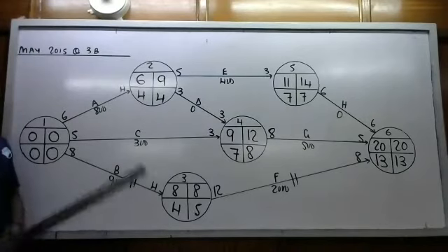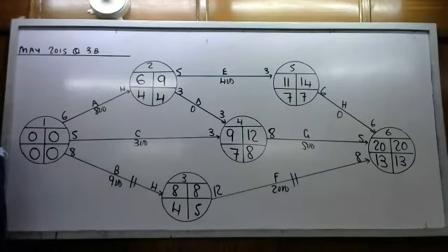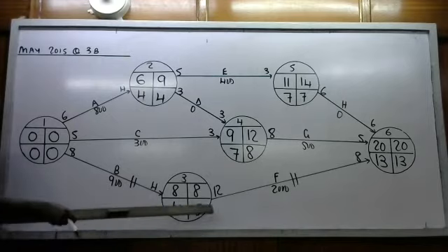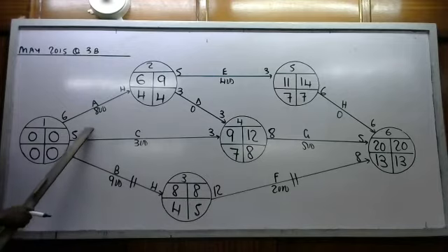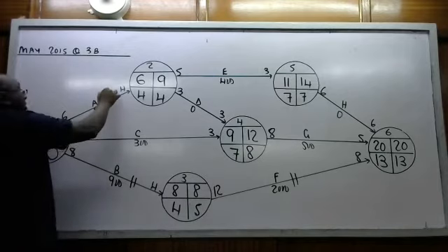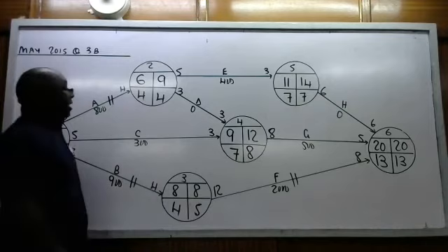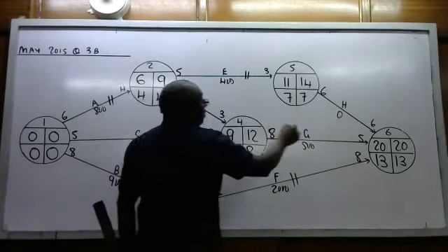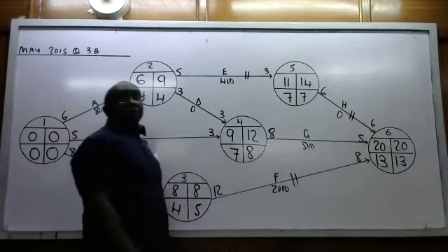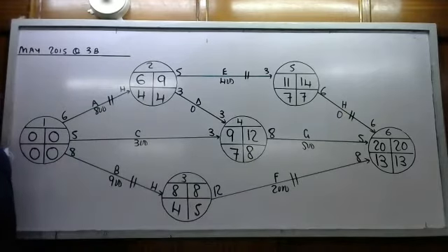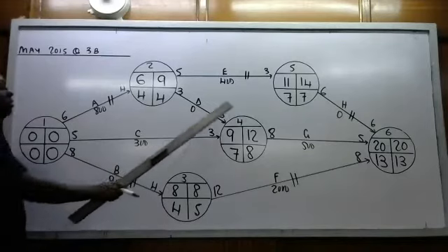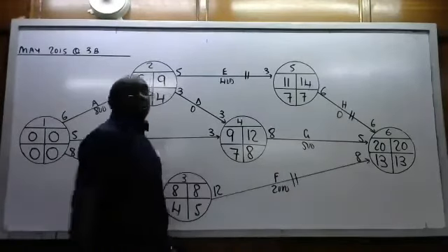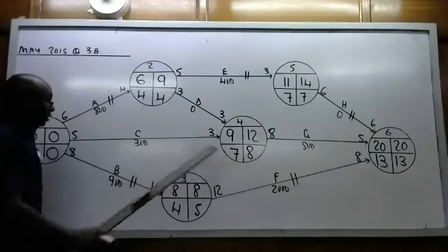And now what you can see there is that the critical part has changed, which I told you earlier is a possibility. Because now B is no longer critical, even F. So the critical one now is A, followed by E, and followed by H. Those are the ones that are critical. Their times are equal. Again, their times now are not equal. You can see that.